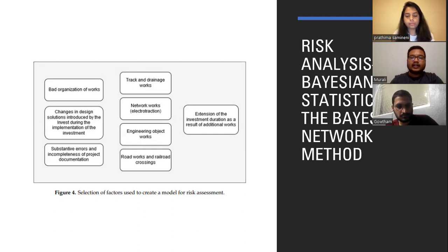Risk analysis was carried out in 4 stages that were related to Bayesian network design. The software Netica was used to build the model in the form of a Bayes network. These are the individual steps. The first one is creating the nodes of the Bayes network, giving relationships to particular nodes, assigning event probabilities, and